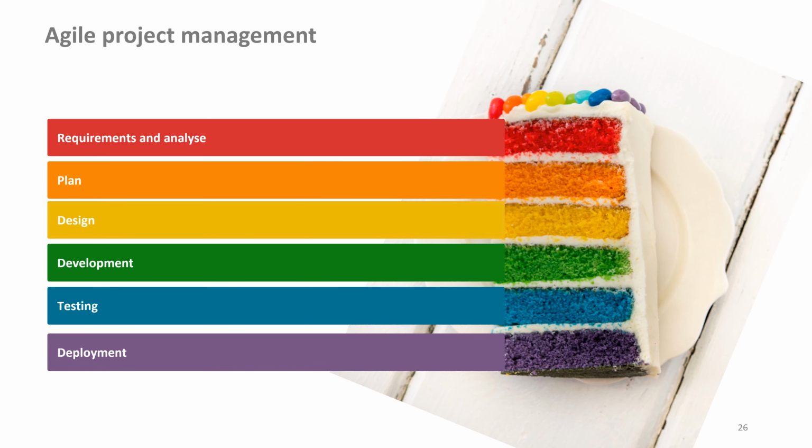Taking the previously mentioned pie principle and applying it to this diagram, we cut a slice out of this pie. In Scrum, we now produce the product in short periods of time. For example, every 2 weeks, starting with the analysis and ending with the delivery. For this, we need different experts in the team.